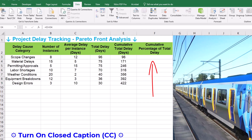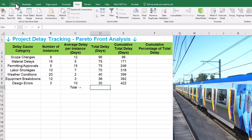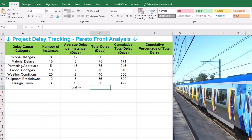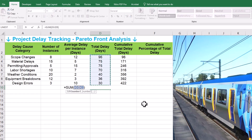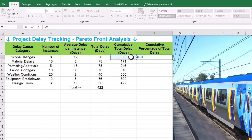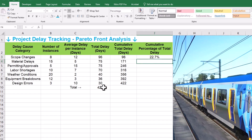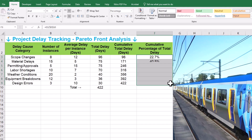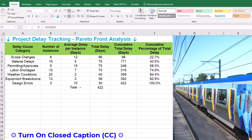Finally, column F — cumulative percentage of total delay — expresses our cumulative delay as a percentage of the grand total delay. First, find the grand total delay by summing up all the values in the total delay column in a separate cell like D10, summing D3 to D9. Then in cell F3, enter the formula E3 divided by D10. Make sure to use a dollar sign to make an absolute reference to D10 so it doesn't change when you drag the formula down. Step 1 is complete — we've entered our delay data, sorted it by impact, and calculated the cumulative totals and percentages.